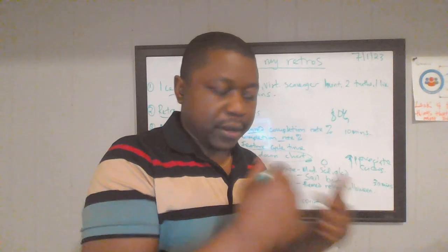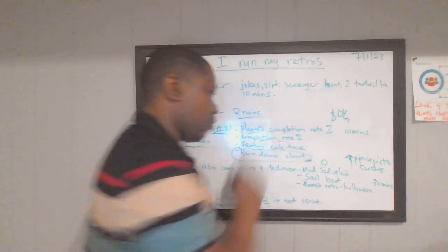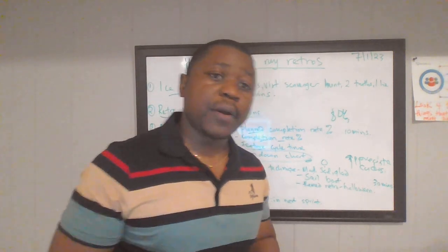So we might switch out a story on the board that is still in the to-do column, and pull in the new story midway in the sprint. Did we complete it? So that is completion rate. Irrespective of whether it was planned or not, did we finish up all the stories? What is the percentage? I share that metric with the team.